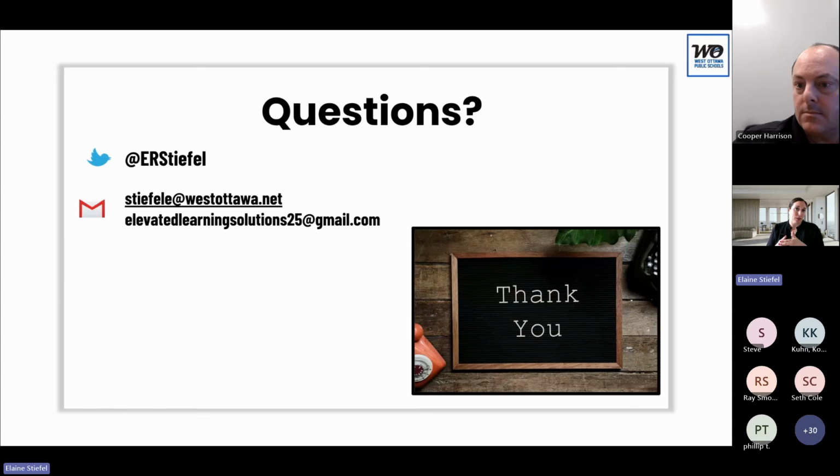Do a pilot for about 6 months, which sounds like a lot, but you have to go slow and start building that foundation to keep that momentum going. And then that way, when you get into your first adoption with about 20 to 25% of your staff, those pilot people will be able to say, hey, I think these teachers would be good too.